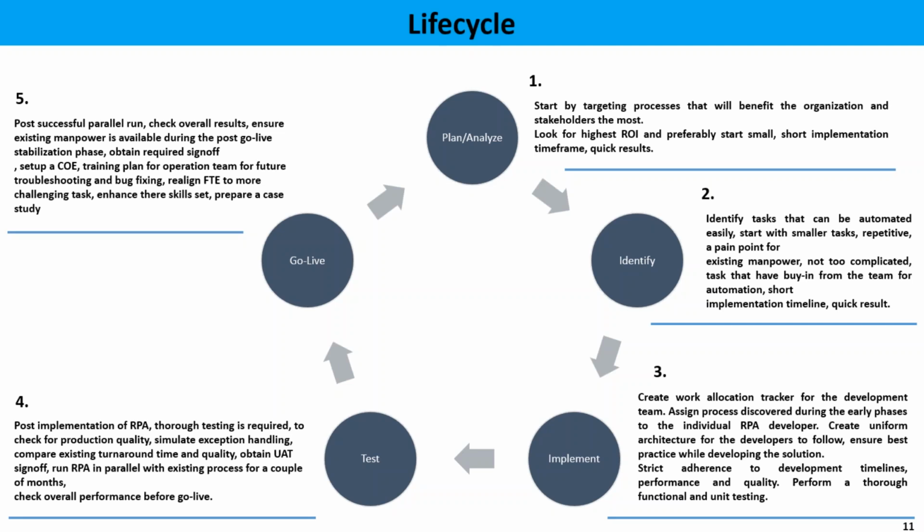In the SIT phase, whatever configuration files, task files, or code blocks we have, we take everything to another machine, which we call the production machine, and we try to set up the same infrastructure there as well. We ask the SMEs or the operations to give us some test data for testing, and if everything is running well, then we can send it to the UAT, that means user acceptance test.